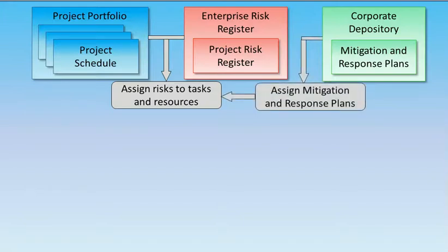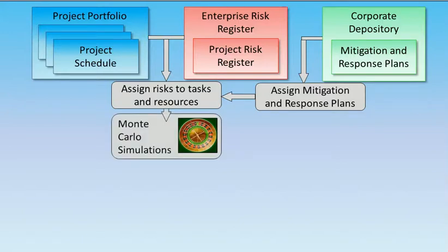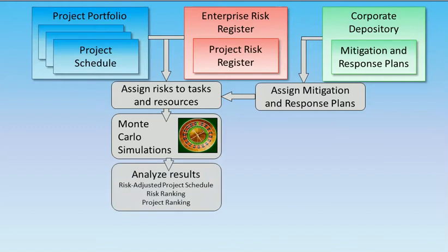Once you have assigned risks to your project schedule, you run a Monte Carlo simulation to analyze the impact of the risks. The Monte Carlo results will allow you to generate a risk-adjusted schedule. This allows you to see how risks could impact project cost and schedule, and what levels of schedule margin and management reserve you require to ensure you can meet key project objectives.